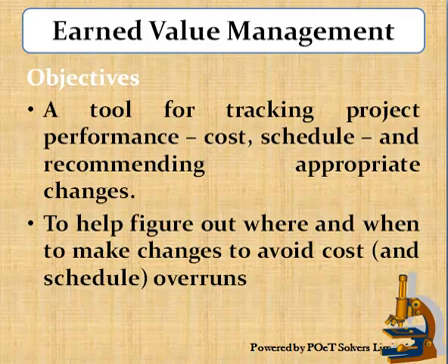The basic goal of earned value management is to save the project from overrunning its approved budget by constantly comparing actual project information to the baseline and recommending appropriate changes. Changes may be corrective or preventive actions. Note that the baseline is the original plan plus the approved changes on the project. Recall that earned value management is the key tool used in cost control, and this is a big part of the PMP exam. You will meet about 2 or 3 questions on earned value management in the exam.